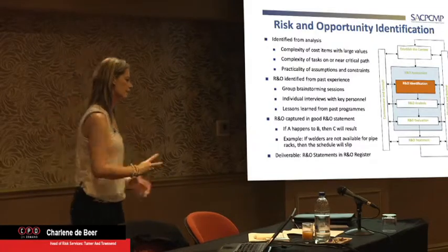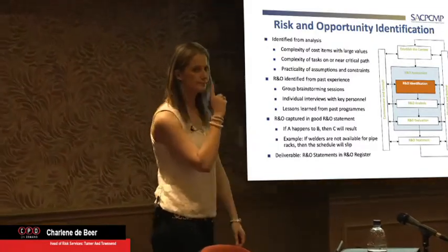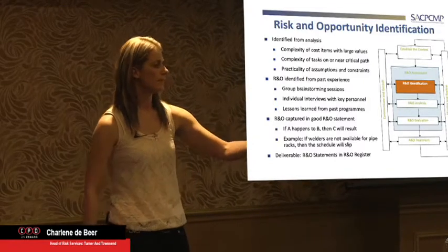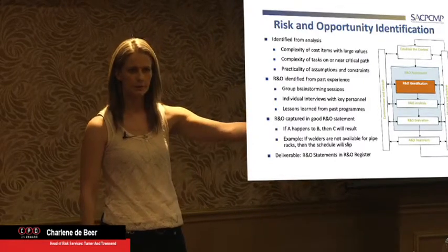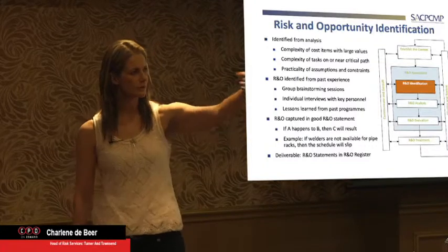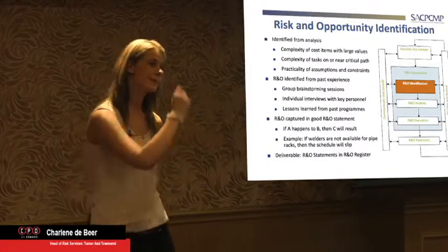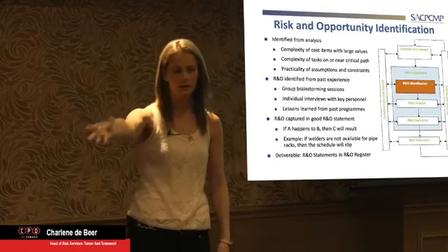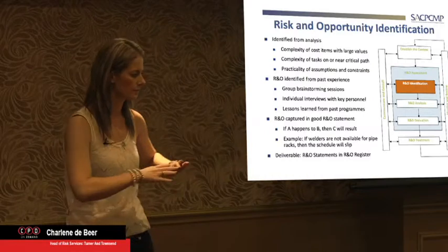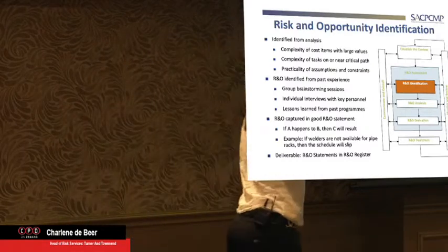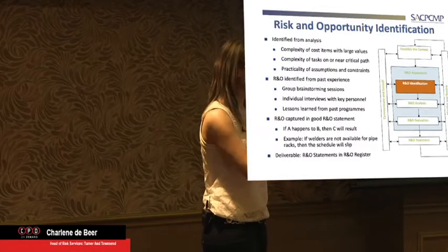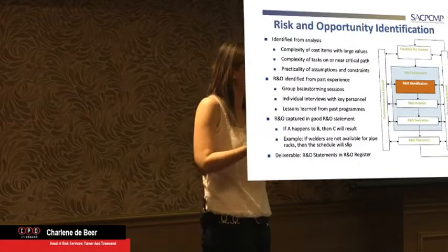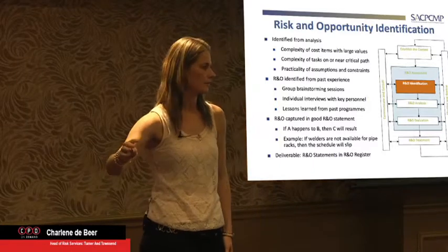So if a risk would happen, it could affect more than one area. There might be an engineering change. Engineering is affected. The engineering change will knock on to something specific in construction. Will it be civils, mechanical, piping, electrical, instruments, whatever? Then if it knocks on, does it mean we have to do procurement of that material, whatever the knock-on is? Do we have spares? Don't we have? Must we go procure? So procurement might be affected, and the cost thereof.